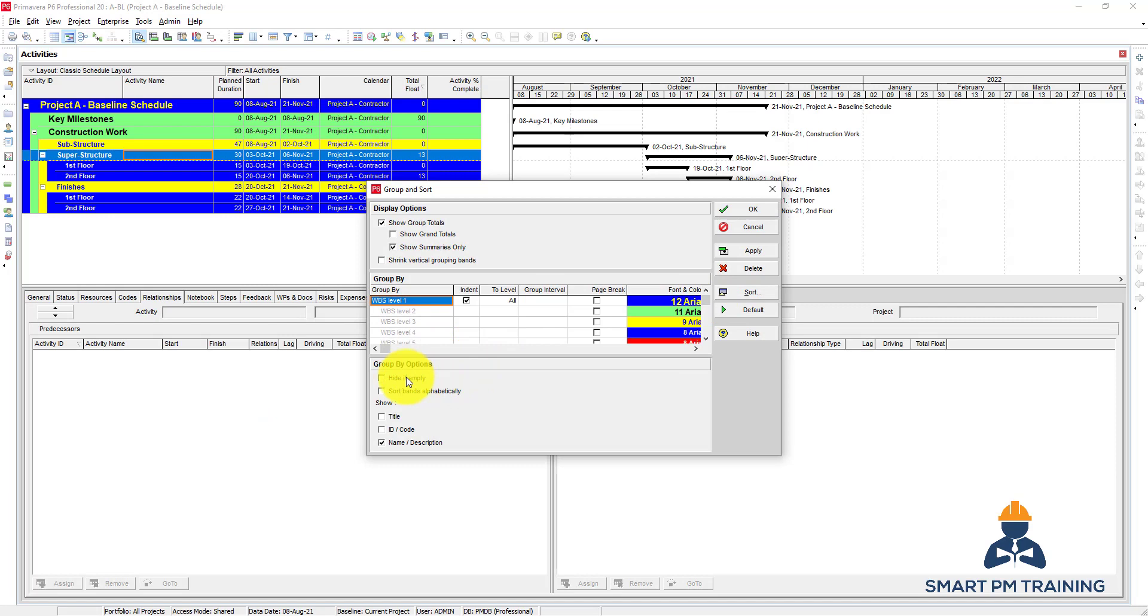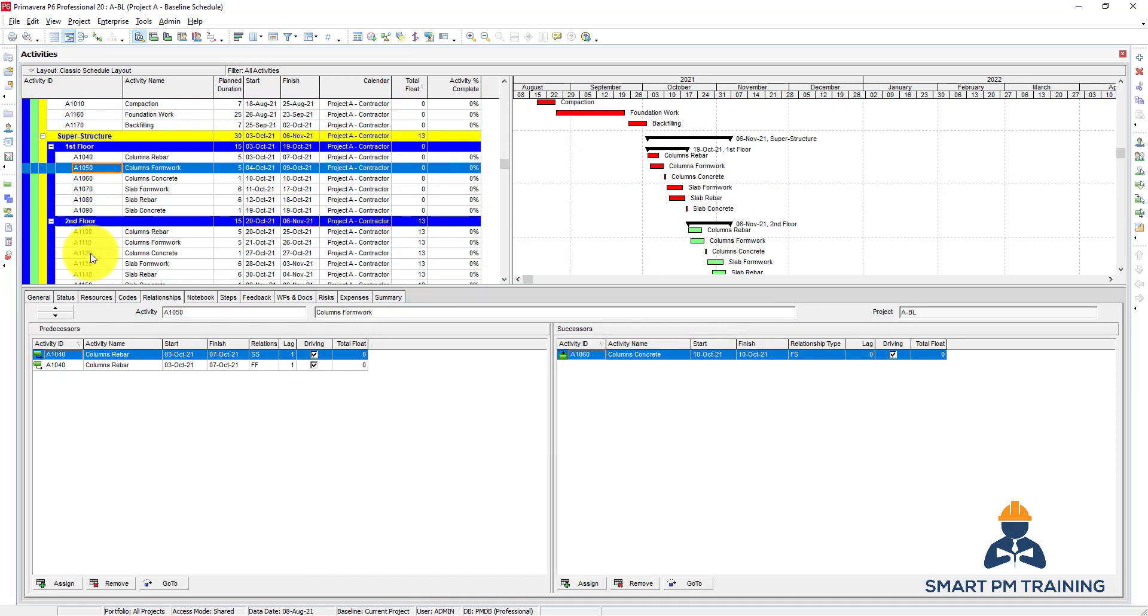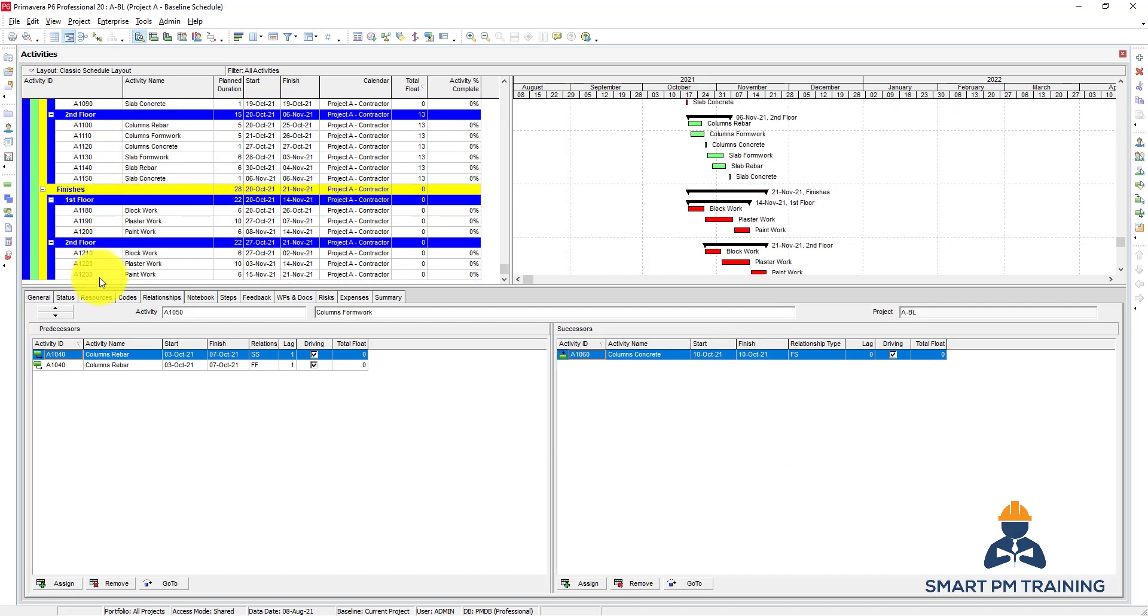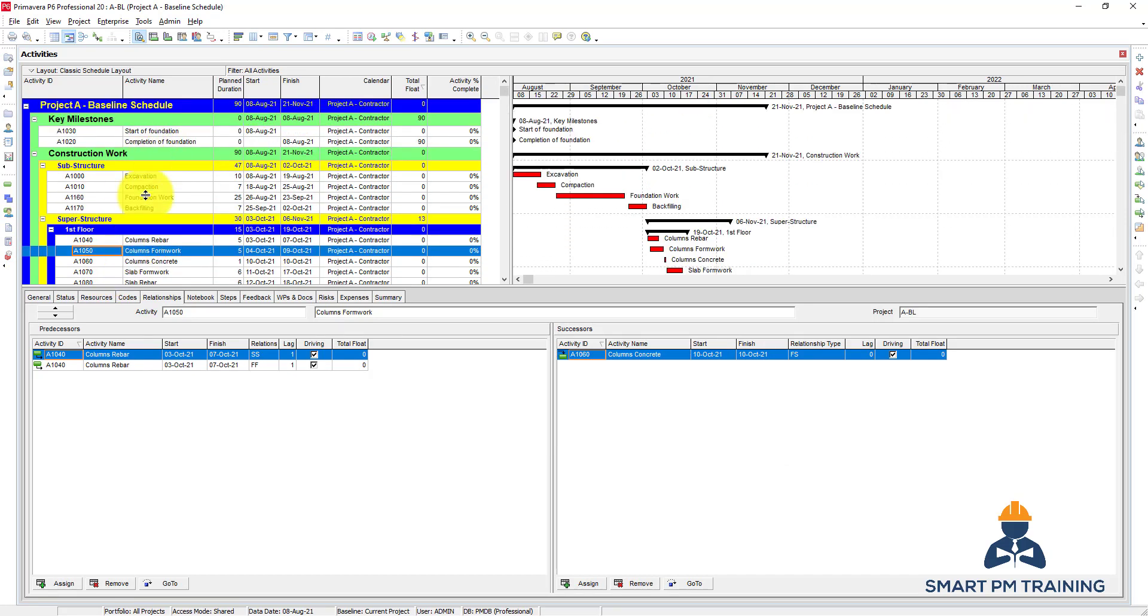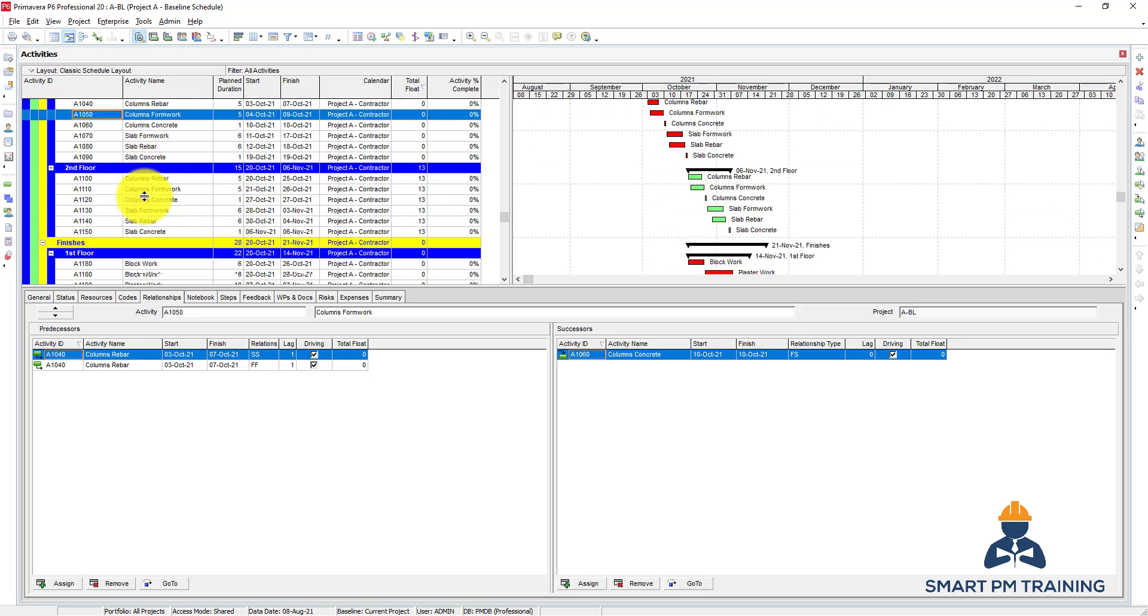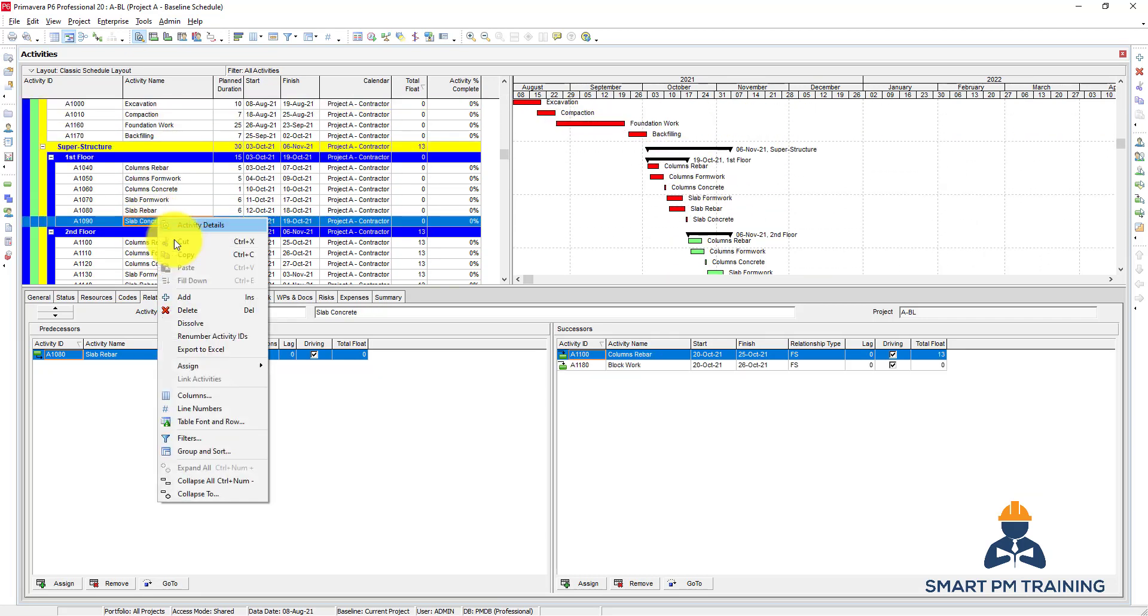You can also choose hide if empty. So if I have WPS here which doesn't have any activity it will be removed, but right now we have activities under each WPS so nothing is hidden here.